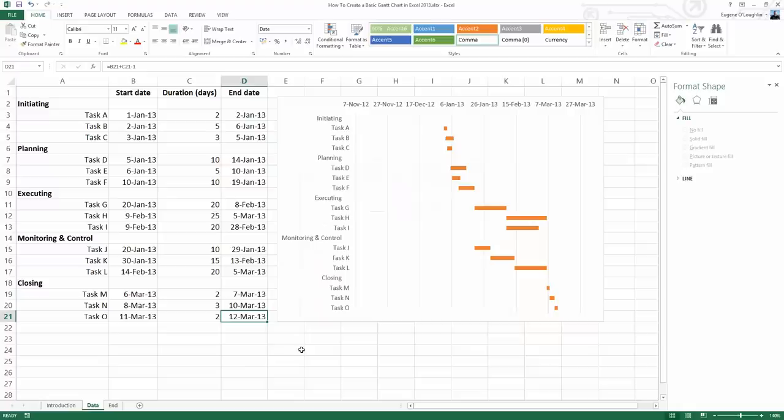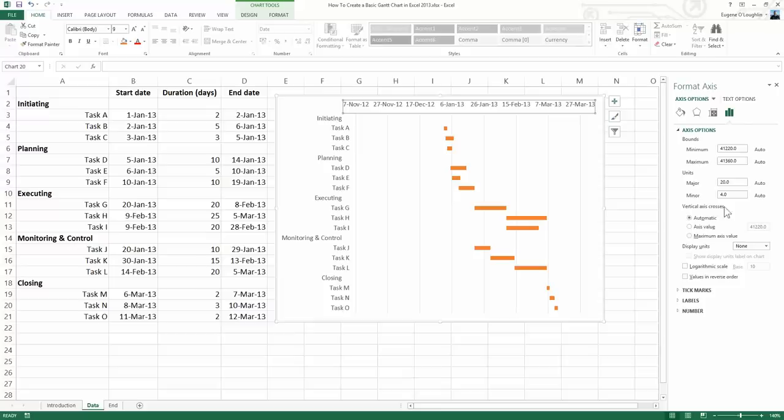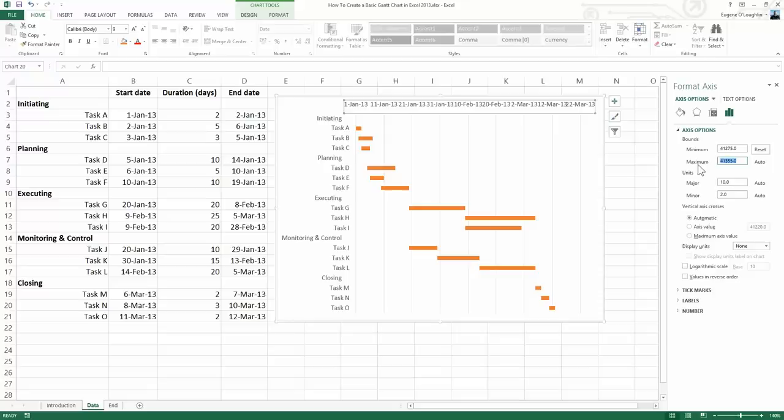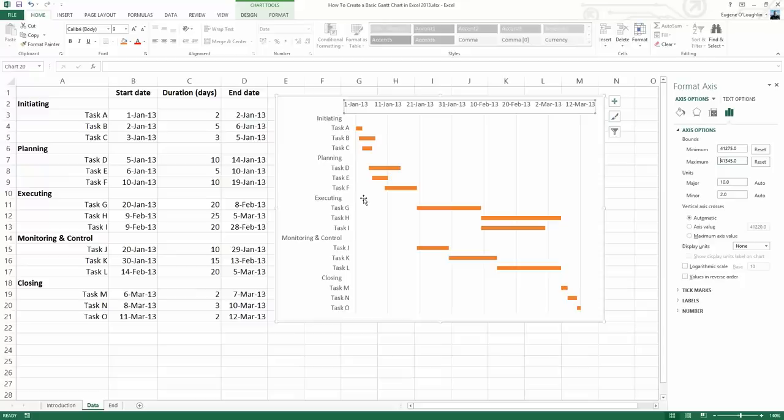To change the axis, we need to click on the x-axis. My chart is at the top, so with your left mouse button, select the x-axis, and you'll see over on the right-hand side the Format Axis window appearing. You'll notice near the top there's a minimum and maximum values, and we need to replace these with the values we noted just a few moments ago. The minimum value for the 1st of January 2013 was 41,275, so I'm going to type that in the minimum window. In the maximum box, I'm going to type in the maximum value that I noted, which was 41,345. Press Enter. We can see on our chart that the space before and after the brown bars has now been taken away.